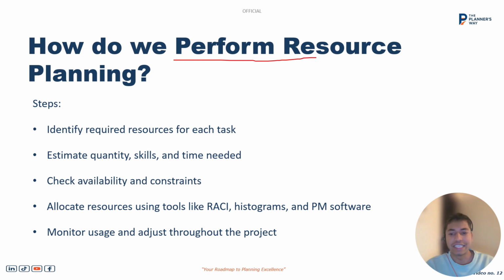The next step that begins after the baselining, or after the preparation of the schedule, is to allocate the resources, where we try to figure out the required resources for each task. For that, we use estimating techniques, how much the quantity is, and we try to figure out from there the number of resources, what skill set we need, and the time for which we need each resource.